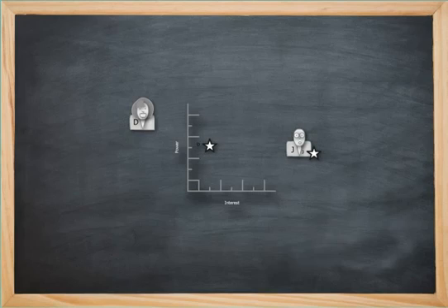Stakeholder John is a customer, and as a user doesn't have much power to make things happen, but has high interest if the project is successful and satisfies his company's needs. You've evaluated his power to be 1 and interest to be way over to 7, very high. Most consultants and trainers love this concept of quadrants, so we're going to throw that up.